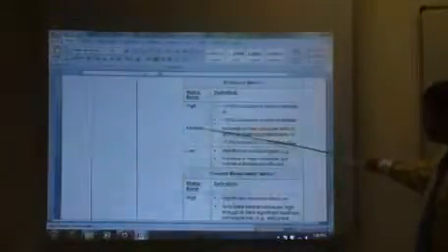there I spoke about earlier on, I said if you look at the schedule impact, the risk on the schedule, you can find a high, a medium, and a low, and the low risk is increasing team schedule but overall schedule not affected. So if a risk is very low, the schedule is not really affected.